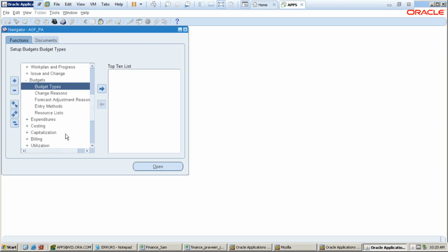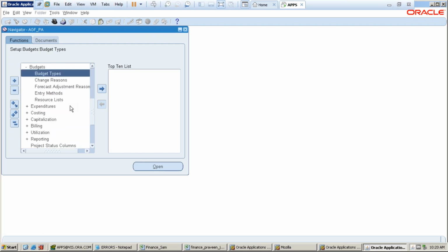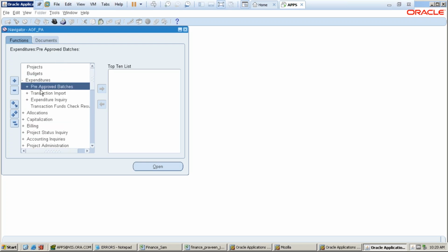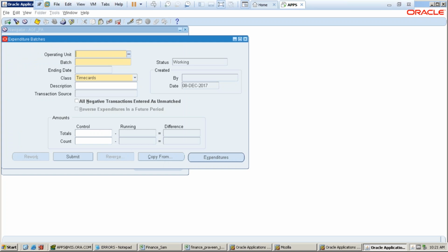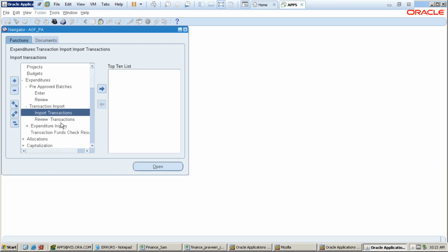No, I don't know. Actually, I was thinking more in terms of POs that need to be in the system, or work orders or POs. I don't know whether they are the same or different. When the project is set up in the system and the costs are coming in, the invoices need to be matched to the PO, the purchase order or work order, and that PO is mapped against the task of the project.